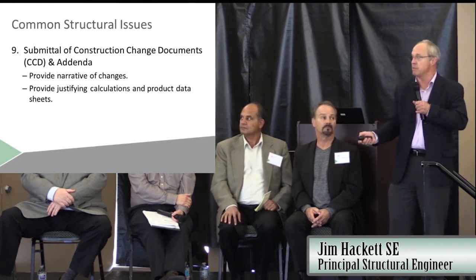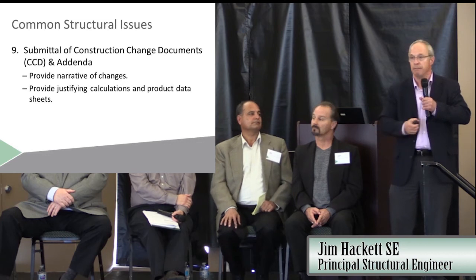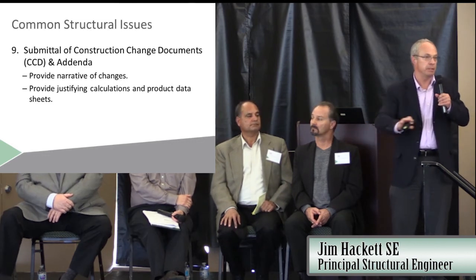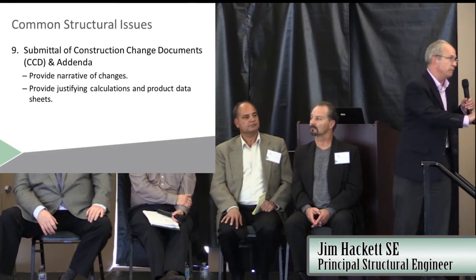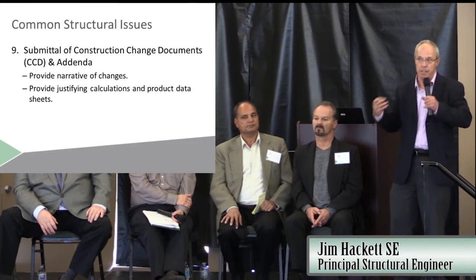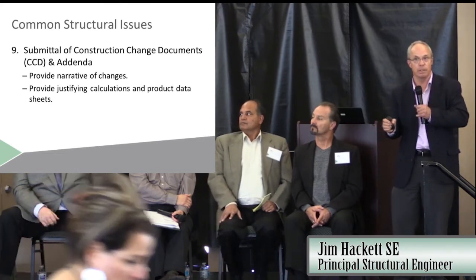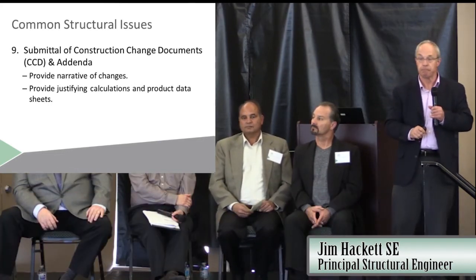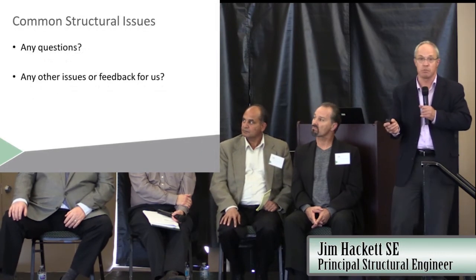You've got to provide the justifying calculations or any product data sheets when you do a CCD. Again, don't assume we have it, because that reviewer is not going to necessarily go back into the file and find it easily. So go ahead and make that copy or include it with that CCD individually. It'll save time for everyone. So that's really what we have for you on our side here from a structural perspective.